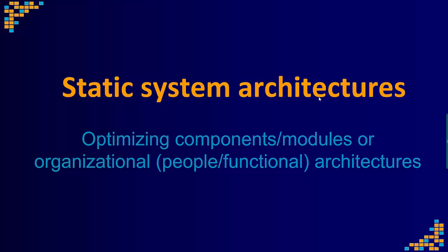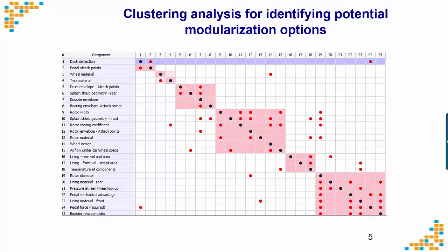There are two main ways you can use PorjectDSM. Firstly, you can look at static systems, which are product architectures, a structure of teams within an organization. So architectures which have no time relation between the elements but have some dependency relationship between those elements. In a product architecture, we can show the dependencies in a DSM and use clustering analysis to try and group elements which have got connection together and less connection to those other elements outside the group.